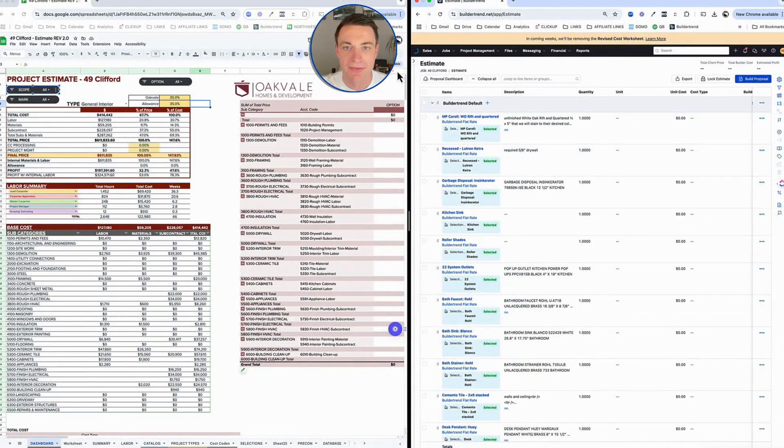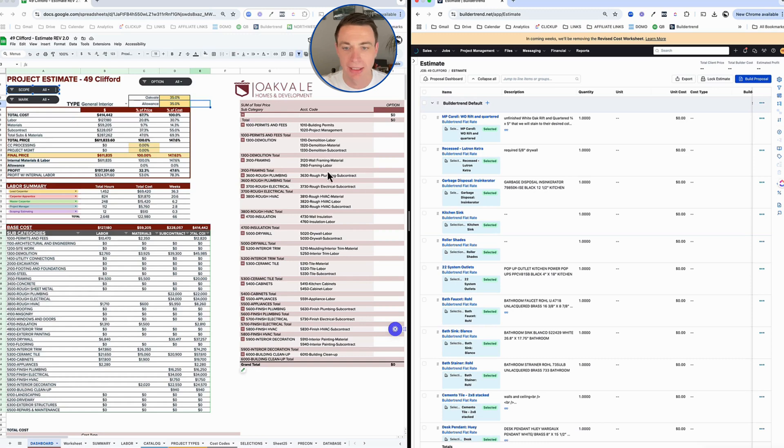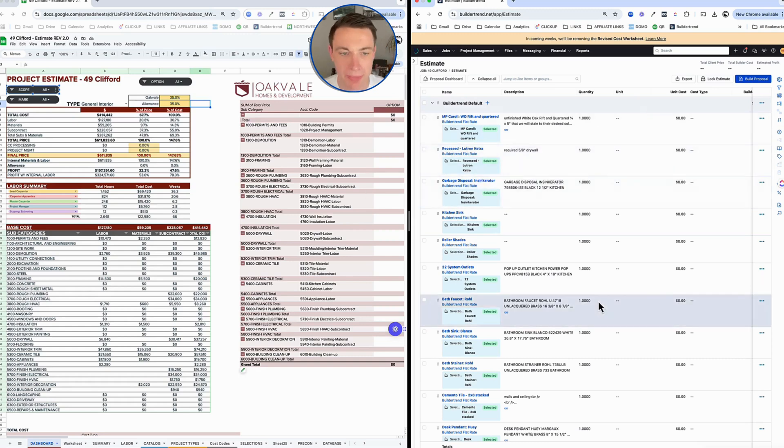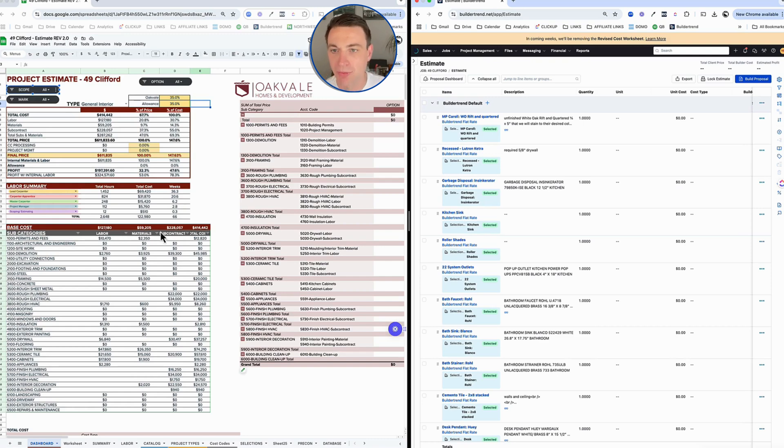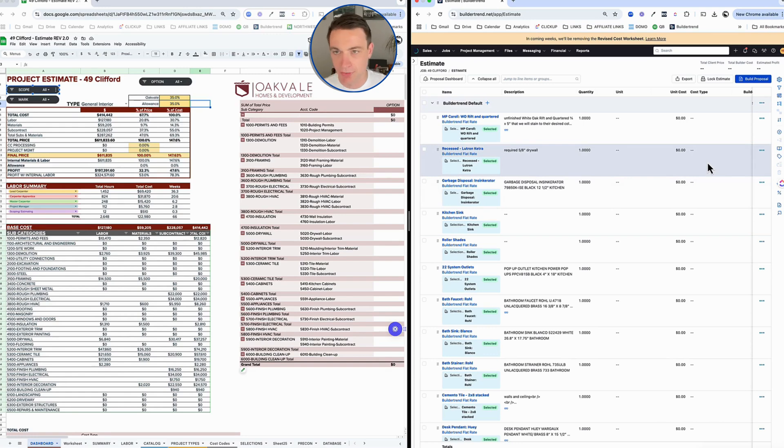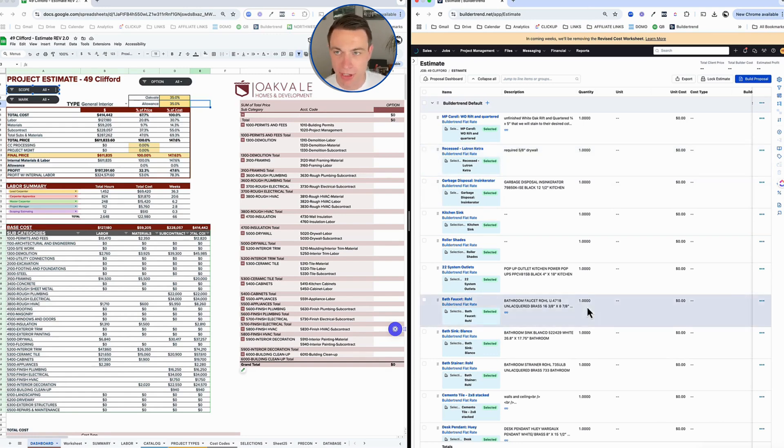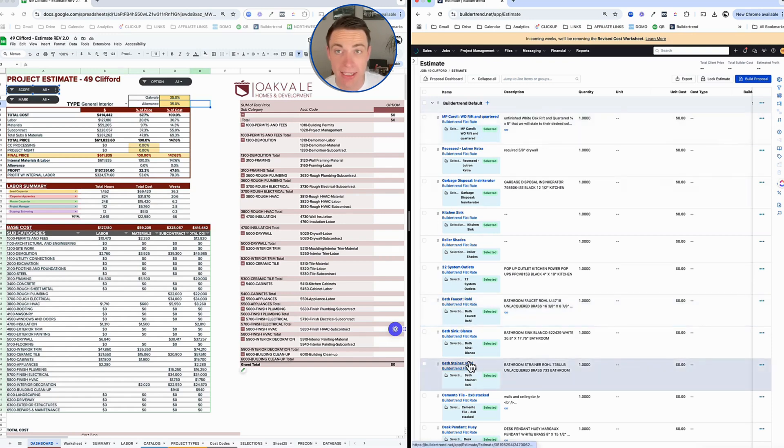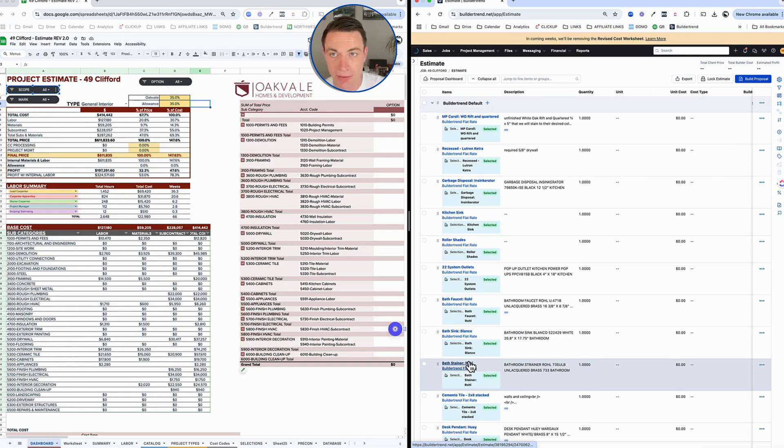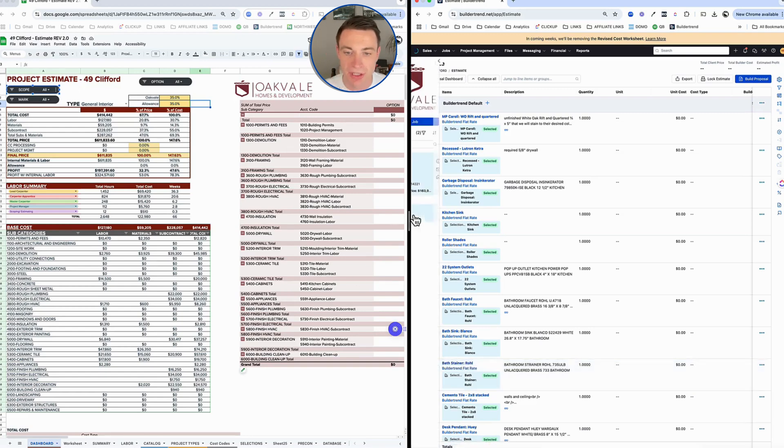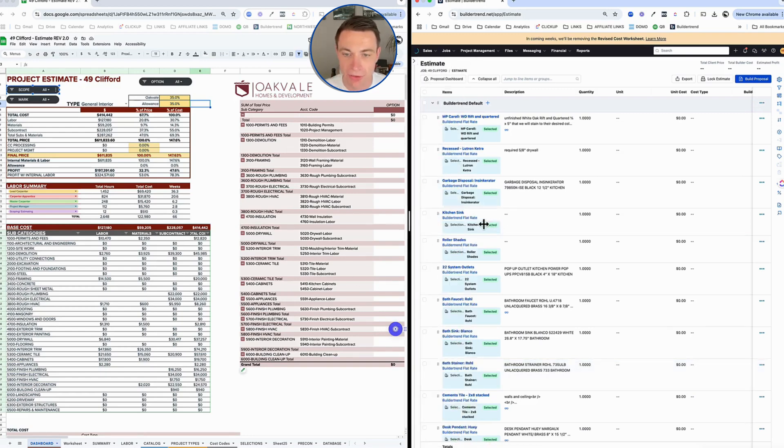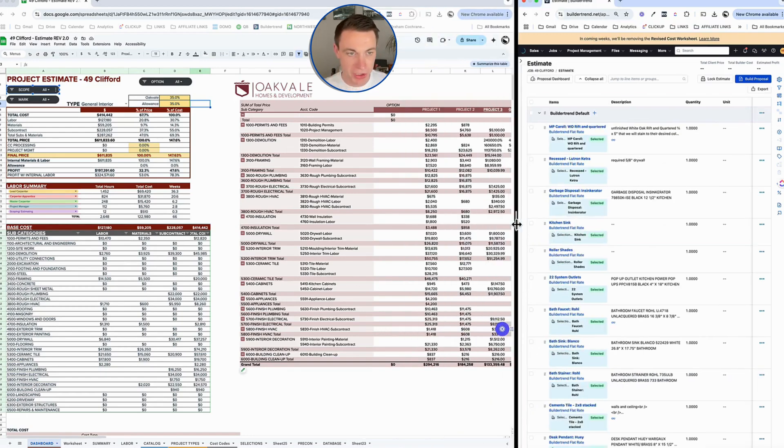I have a job, 49 Clifford, that I'm going to use to demonstrate this. On the right, I've got BuilderTrend. On the left, I've got my Google Sheet template. The first thing I'll say is that when we're about to import into BuilderTrend, we want to make sure that we've zeroed out all of our selections. We don't want this estimate to have anything in it. Even if we're doing some work on pre-construction on selections, move them all to pending. We want this to be zero. Same thing goes with our change orders and our bids. I want this completely zero until we lock the estimate.